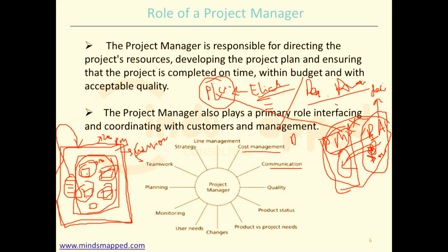We talked about the resources, right? If I want to give this fusion as a category, I need to have 4 resources: one lead, one BA, one software engineer, and one tester. So what we are doing is costing it. We are raising a cost based on each and every resource, and that's the reason we have something called cost management. And then we have quality.